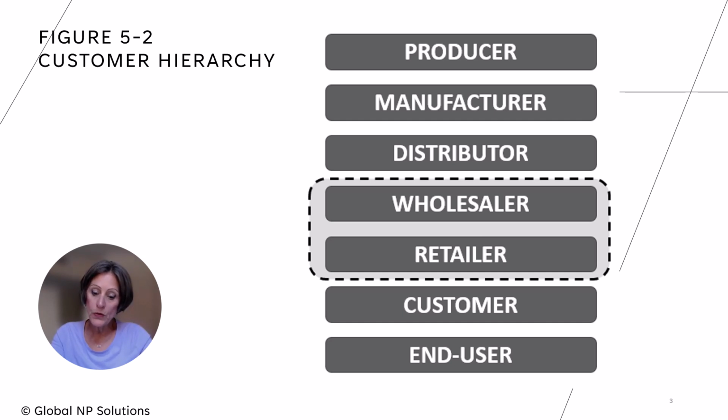Therefore, if customer risk is medium to high due to lack of direct end user interactions by the producer, a staged and gated process can be effective for new product development. Note that the NPD team still must have in place an efficient and accurate way of gathering requirements, typically from higher level customers, yet typically they do not engage in frequent interaction or direct conversation with end users.